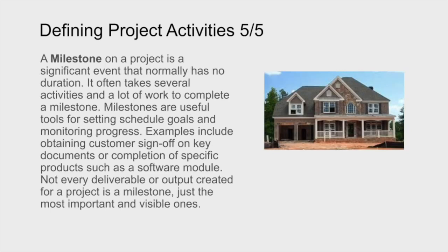Finally, we have what's called the milestone. The milestone is really an important marker within the project. So we would think, for example, if we're building a house, that the milestone is actually the day that the people move into the house. It's an important point. So these examples would include sign off from the customer, key documents, specific products such as software modules being delivered, these sorts of things. These are all considered as milestones.